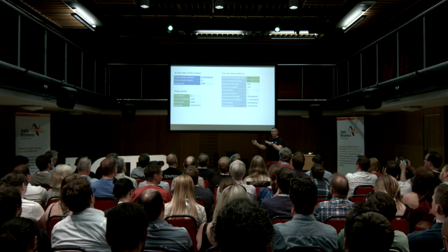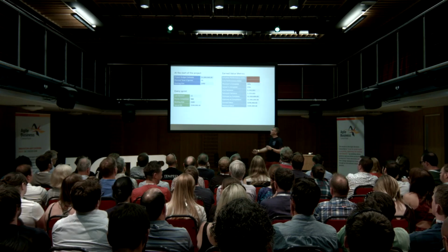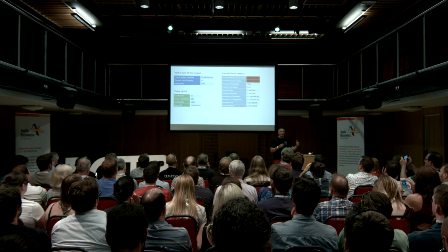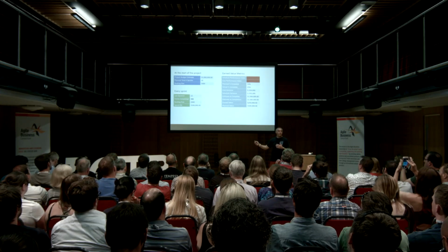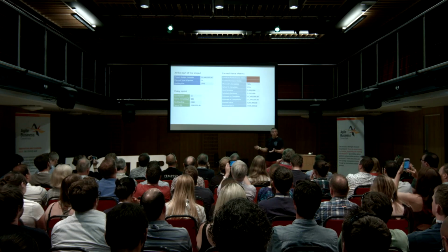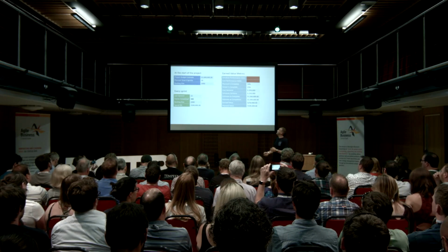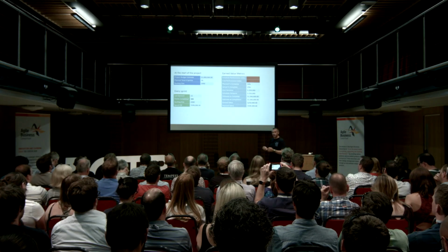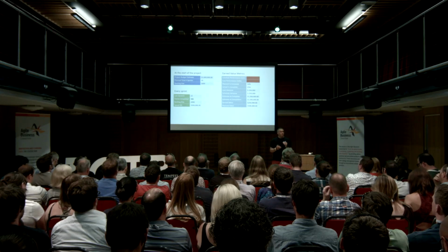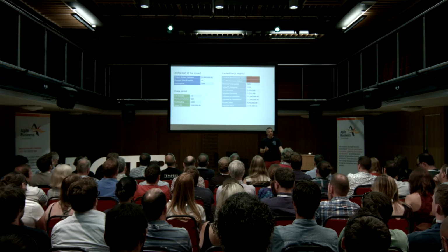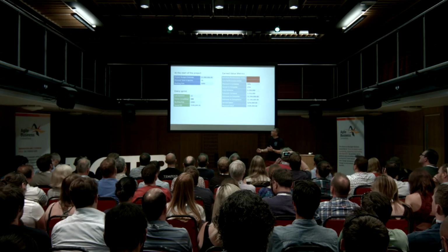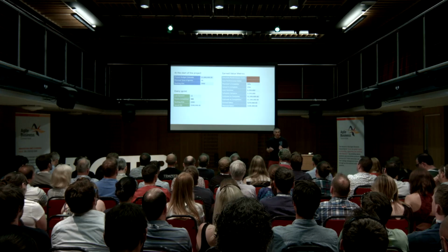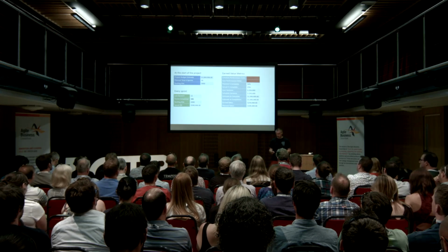So let's look at a few examples of how this works when you've got different numbers. So say we got to the same point in the project, and instead of completing 1,000 points, we've only completed 500. So we spent the same amount of money, but we have delivered much less. So in this example, both of our numbers drop down to 0.5. So this is saying we're pretty far behind where we wanted to be schedule-wise. And because we spent half the money, but we've only delivered a quarter of the work, we're also quite far behind cost-wise as well. So we're pretty over budget.